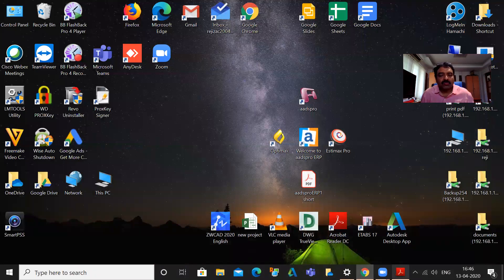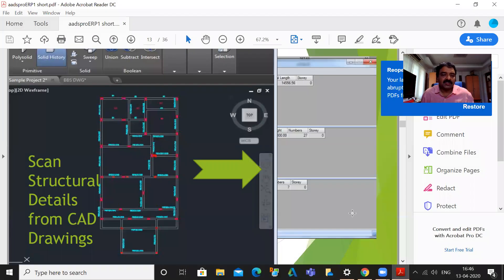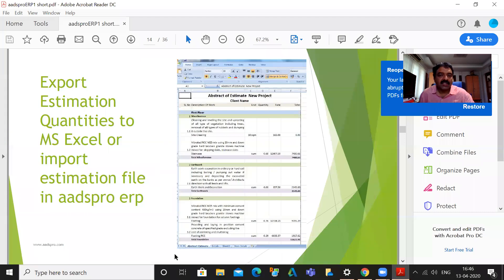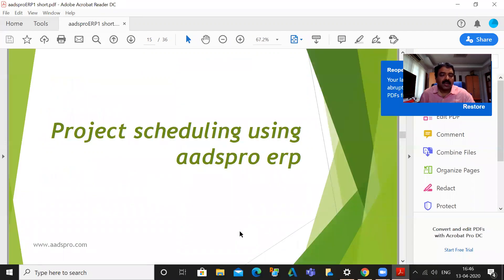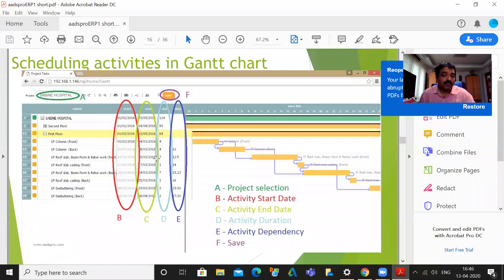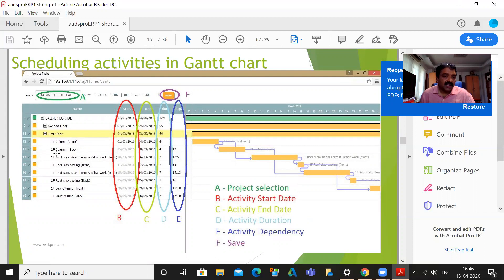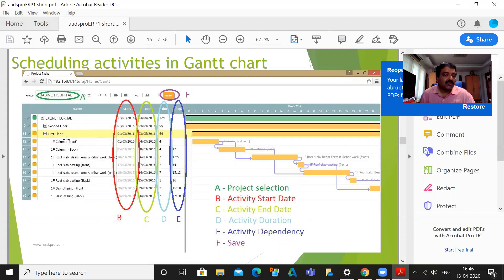Coming back to what we were discussing, we got the files in an Estimax estimation file, and once exported to the webpage, you can add the time. This is the items which you got from the Estimax file, which is uploaded in the webpage, and you can see that the time is also added. So once the time is added to your activities, the entire other data—the man material, machinery data, and the time data—is connected for each task.